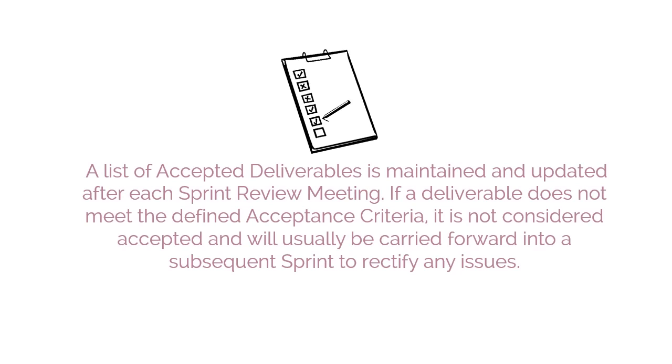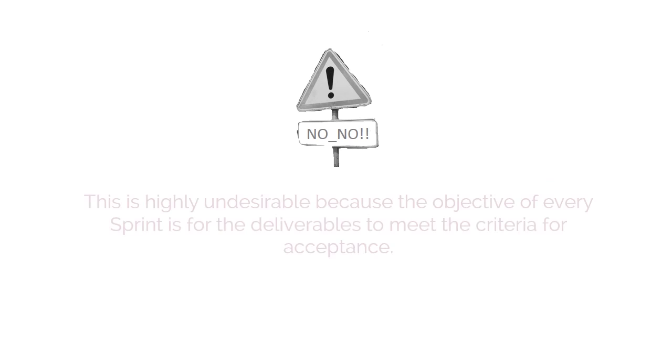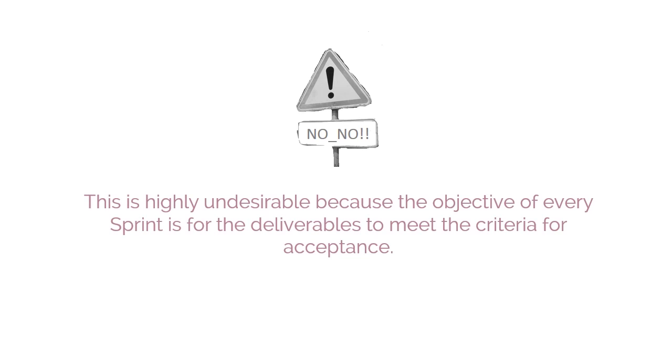If a deliverable does not meet the defined acceptance criteria, it is not considered accepted and will usually be carried forward into a subsequent sprint to rectify any issues. This is highly undesirable because the objective of every sprint is for the deliverables to meet the criteria for acceptance.